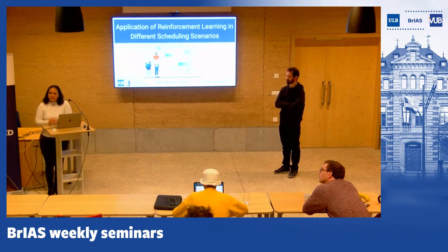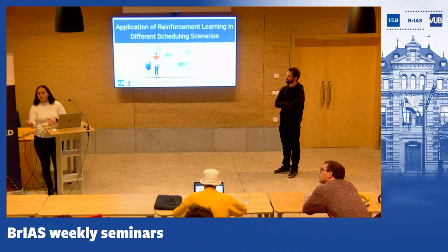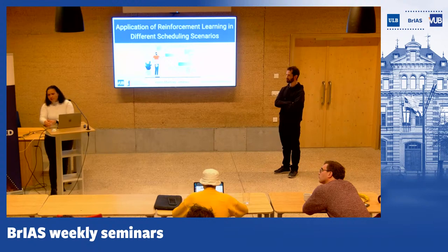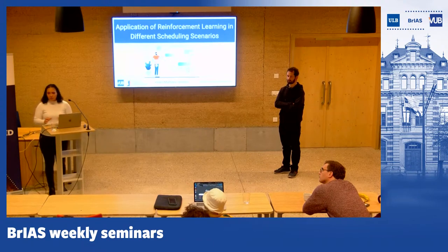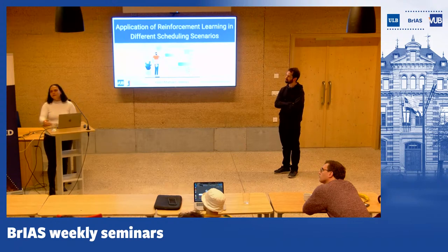Yeah, thank you. Well, we also have the possibility to start not from scratch, I mean not learning from zero, but if you already have experience solving a specific problem, you can start with something that you already learned before. We are also allowing the user to determine whether they want to learn from scratch or to start from something that has been learned before, and we also allow the user to say whether they want a protected schedule or not. So for example, in this scenario, you want to build 200 tables, I can finish this in 5 days. That's the optimal solution, but that's not the realistic one. So we could do it in 9 days, for example, if we go for the criticality approach, so we are protecting a bit, or we can have a higher amount of protection, and we can say that to be on the safe side, this can take longer, and you can change the amount of protection you want to integrate.